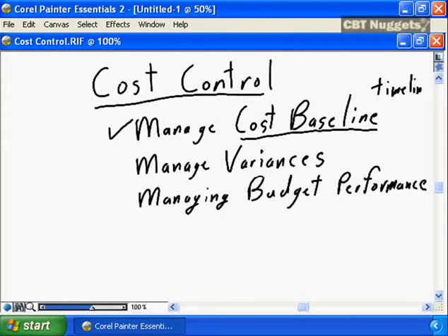As we discussed in the previous nugget, you can be in as much trouble as a project manager, and I've been there, let me tell you, delivering the project on budget, but not meeting the cash flow analysis, surprising the accounting department with a bill for $20 or $30 or $50,000 in a month where the cash reserves and the cash management plan wasn't in place, simply because you accelerated the project, simply because you brought in an expense to your project a month or 2 or 3 months earlier than the original cash flow plan.